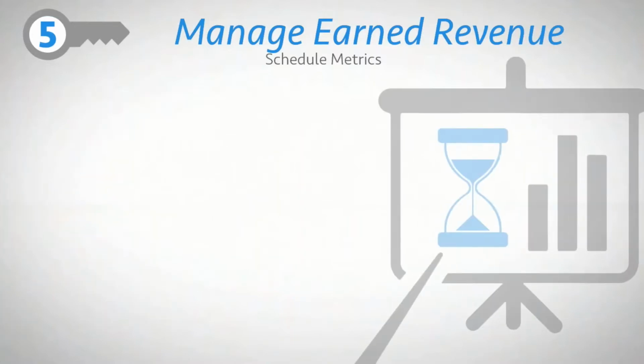To gain schedule insight, here's some helpful metrics that leverage planned revenue and earned revenue. First up is schedule variance. Schedule variance offers an assessment of whether the project is currently ahead or behind schedule. This is done by measuring the difference in time between the current earned revenue position and when planned revenue is targeted to be at the same position.